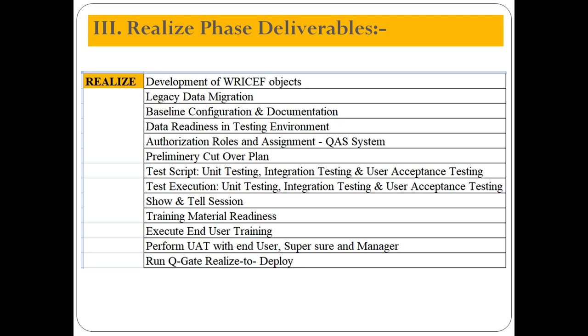But here, in integration testing, I'm talking about how the SD module is involved, how the production planning module is involved for the make to order process, how the procurement department procures the material based on the production order requirements, how the warehouse clerk receives and issues the material. Finally how the final product is received, then delivered to the customer, and how the accounts department receives the money from the customer. Like that, the whole end-to-end cycle has to be tested.